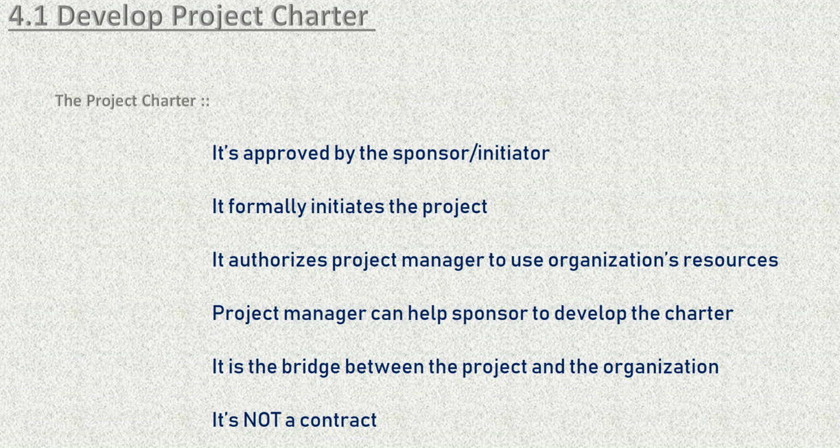So in that case, the project charter will be replaced by the contract itself. Okay, so it's to be noted that whenever the initiator of the project and the executor of the project are under the same organization, a project charter suffices. But whenever two different organizations are involved, whenever some legal consequences are involved, it's the contract that comes into the picture. So that's all about some key features and understanding related to the project charter.